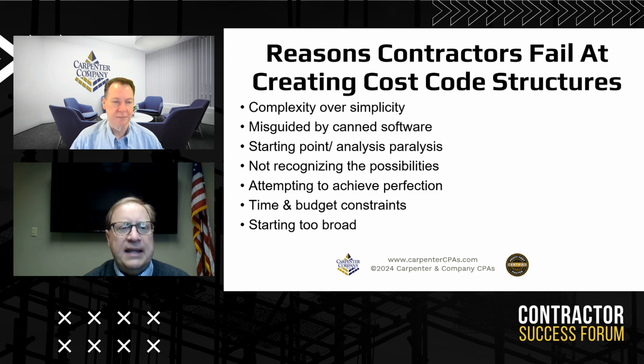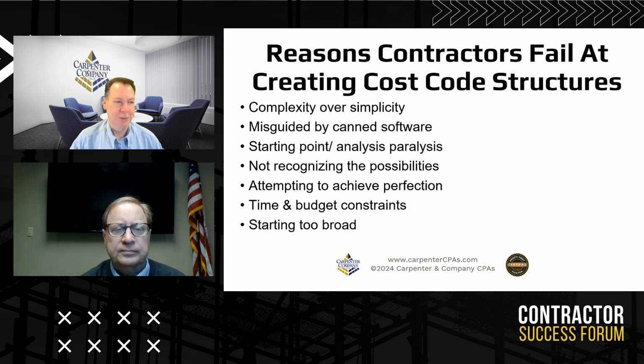Sure. And how are you going to explain that to others in your organization if you get too complex? You know that acronym KISS, keep it simple, stupid. A lot of my contractors will tell me they've got a gut feel. They know how their jobs are doing. And usually they do, and they know when one's going bad. But sometimes they are fooled into thinking that the big jobs or whatever are profitable. And when we get a good cost code structure in there and we look at it a year later, they find out the things that they thought were making them money were actually costing them a lot of margin, as well as costing extra overhead.